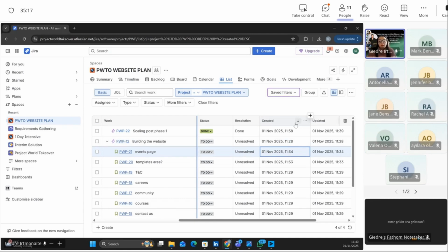Or, in real projects, before my sign off you should actually have a quality assurance person, a tester, go in and test it. So the resolution would be, Rachel comes in and says she has designed the events page. The testers then test it. Can they access the events page? Can they see all the events needed? If they wanted to sign up for an event, did it work? They do the testing.